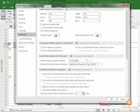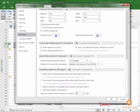I highly recommend that you keep this value at less than two days, ideally one or even zero if you want to do critical path analysis as it's meant to occur when there's zero days slack. For now, we'll return it to zero, but you can adjust this for your needs.